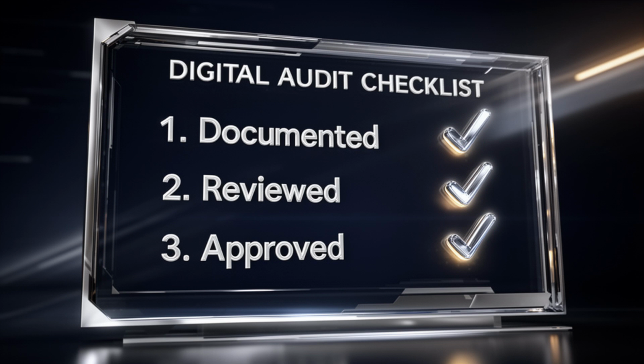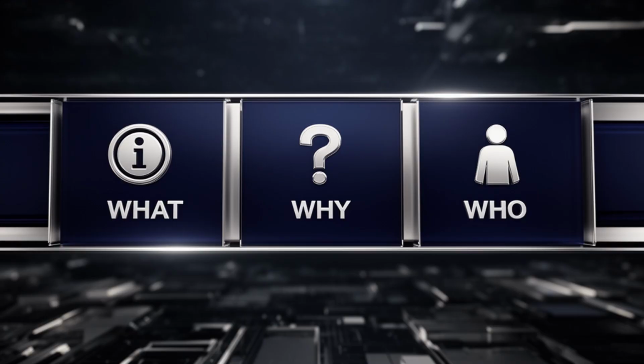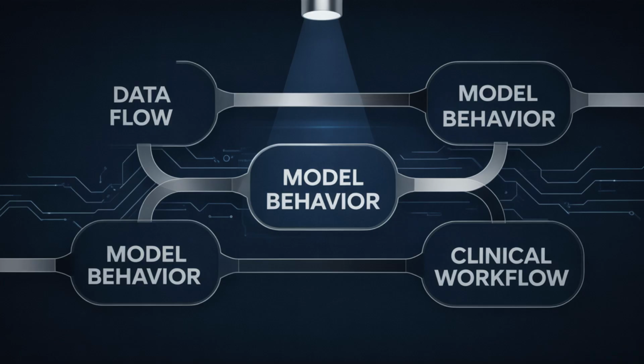First, change control. Every change must be documented, reviewed, approved. We clearly define what is changing, why it is changing, and who approved it. Now comes the most critical step: impact assessment. We ask, what does this change affect? Does it impact data flow, model input, model behavior, clinical workflow?